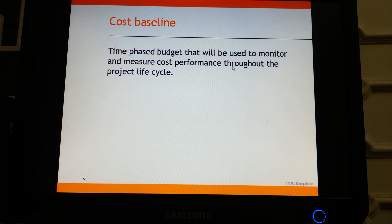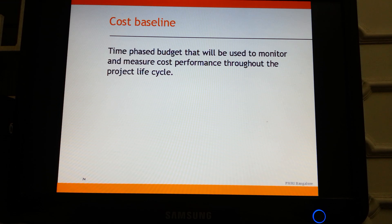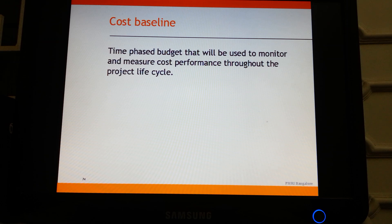A cost baseline is a time-phased budget used to monitor and measure cost performance throughout the project life cycle. In one organization, we had monthly budgets for projects — January's budget had to be consumed in January and could not be carried forward to February. This is best practice, especially if your client follows generally accepted accounting practices (GAAP), which typically insist on a time-phased cost baseline.